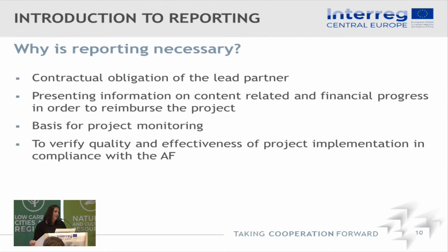Authority. In these progress reports, you will be presenting information on the content-related and financial progress, and this is the basis for you to receive funds back. So this is the basis for the reimbursement. You do not report to us, you cannot get the money back. And the progress report is ultimately the basis for the program bodies to monitor the project, to verify that the quality and the effectiveness of the project implementation is in compliance with the application form.